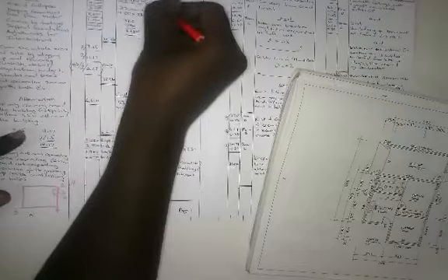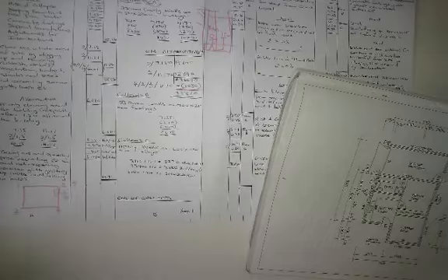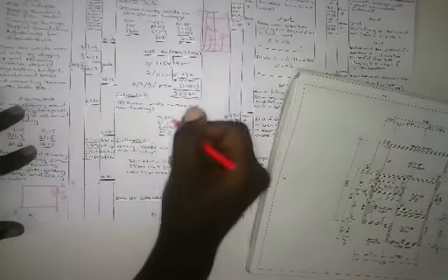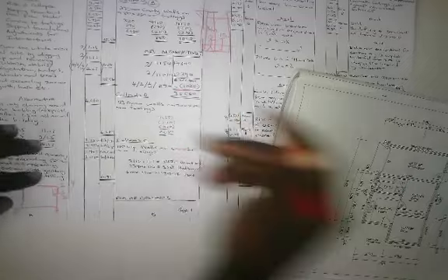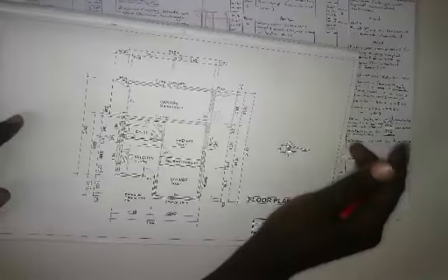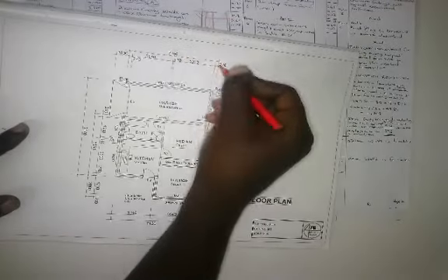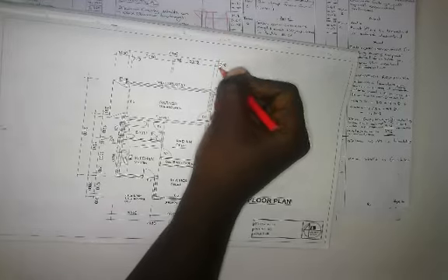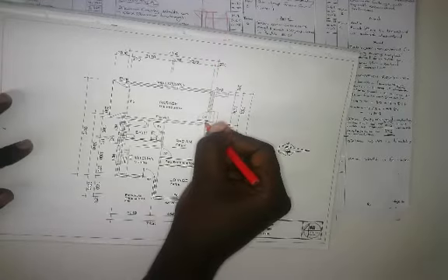That is your center line for your external brickwork. Okay, and that you will name collects A. Okay, that's your center line. And then you're going to go to your second biggest wall, which is 230 wall. And then you will just need to go and identify where your wall spans from in your 270 wall, in your 230 wall.